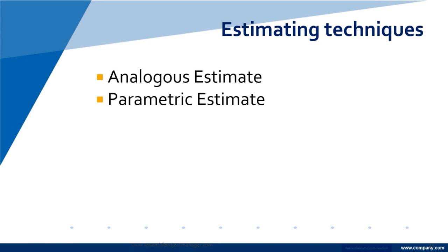So it's not just saying, did you do it before? Let's get an estimate. It's saying, what's happened? What are the different pieces? It can be something like, you've estimated that it's going to take 10,000 lines of code to do this, and 10,000 lines of code cost this much and are going to take this long. Yes, I've crossed over a bit. What did I say? It cost this much and it lasted this long.